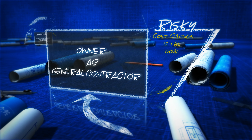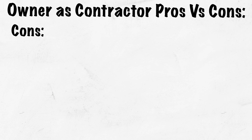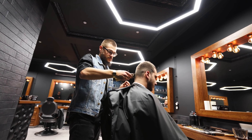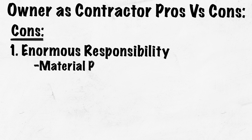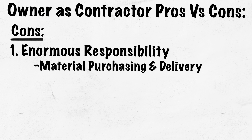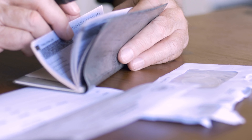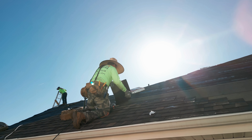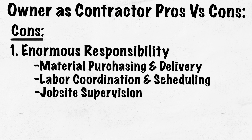The third arrangement is when the owner decides to be the general contractor and subcontract everything out. The owner takes on more responsibility in making sure all materials are purchased correctly, construction is done correctly, and payments are made appropriately. He finds the framing contractor, the roofing contractor, the concrete contractor, the mechanical, electrical, and plumbing contractors, and needs to be aware of what each one has to do.